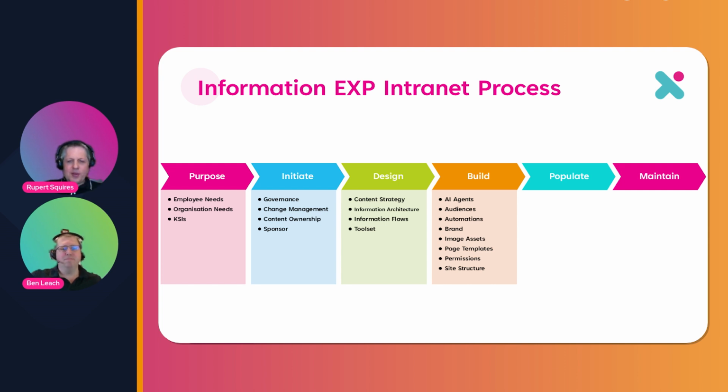Now, you've built something, but at this point we don't have content, do we? No, we do not. No. So effectively what we have at this point is a skeleton that is empty and waiting to be filled in with lots of content. And for a lot of organizations, actually, this is a bit where it really gets quite difficult, because this is where we need to get those content authors in, start populating that content. They need to be trained, and we need to think about what our launch date is and what we're working towards to get us there.